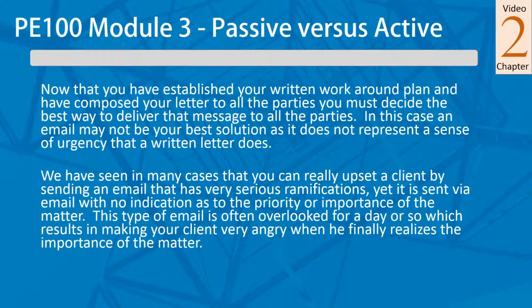Normally, what I would do, or most project managers would do, is write a formal letter, copy everybody on it, and have it delivered to everybody. And as part of that formal letter, I'd have the mitigation plan behind it on how you're going to do the workaround to allow that project to open on time, even though they don't have the fixtures they wanted from Italy.